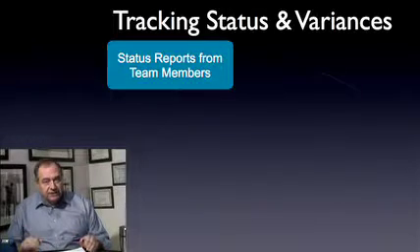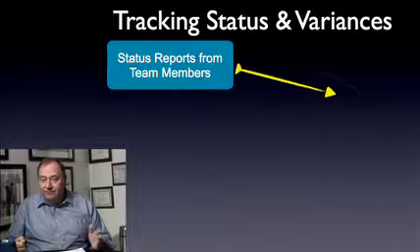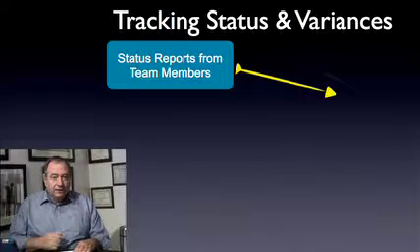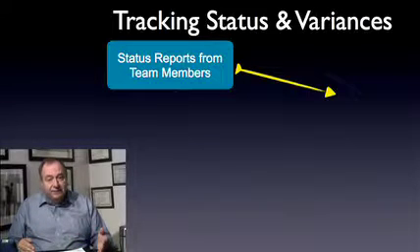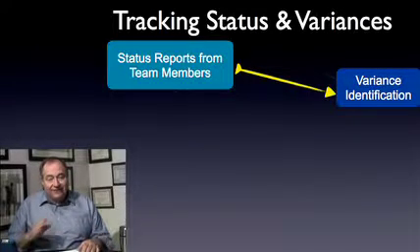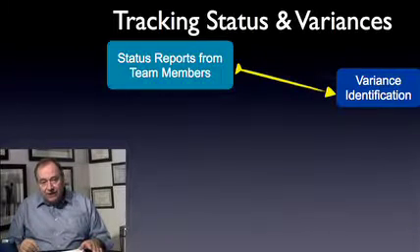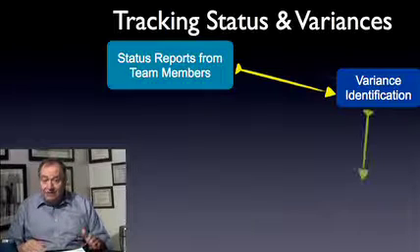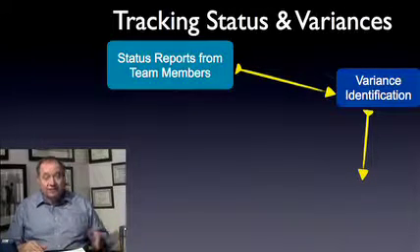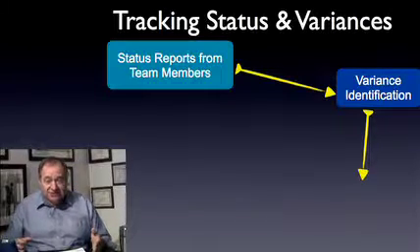A better process is to have people report their time and their estimate to complete on Friday afternoon, say. Then the PM starts Monday morning, taking that data, updating the schedule in 10 minutes, and finding out where the problems are. It's far better for the project manager to have individual discussions with the people whose tasks show variances than to make everybody on the project team sit in the room and listen to those stultifying discussions.